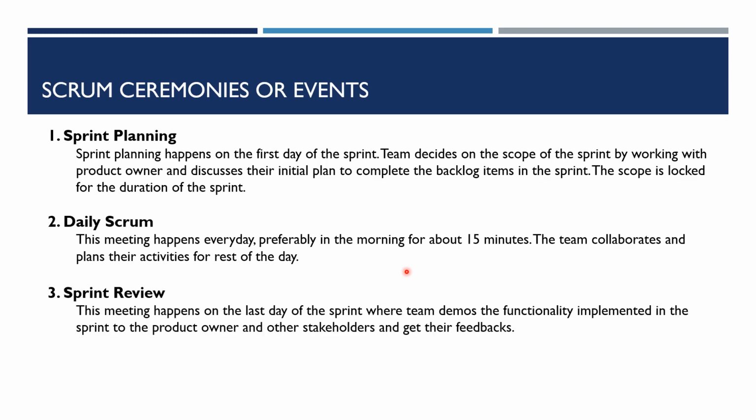The third ceremony is the sprint review. This meeting happens on the last day of the sprint where the team does a demo of the functionality which is implemented in the sprint. So whatever you have implemented, go review with the customer and other stakeholders, get their feedback and implement that feedback in the next sprint.